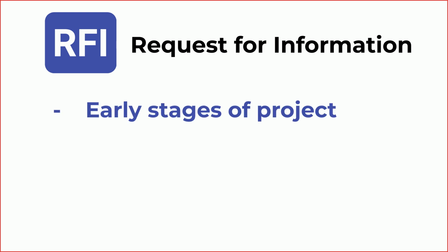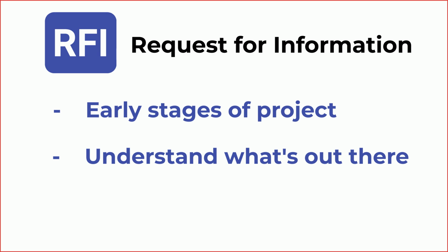Let's start with the RFIs. RFIs are great when you're in the early stages of a project and need to understand what's out there. Think of them as a fact-finding mission and a way to initially qualify suppliers. For example, imagine your company is exploring a new software for managing supplier relationships, but you don't know what features are available in the market.